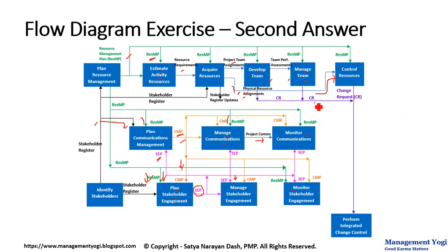Then you have change requests. All these change requests that you are seeing are acting as an input to the perform integrated change control process, where the change request will be approved, rejected, delayed, or deferred by the change control board.